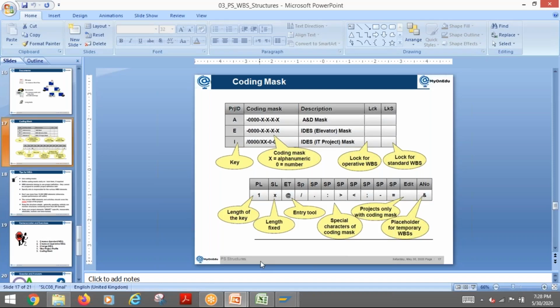Basically, as per my knowledge, for network activities I don't think more than 4 levels are required. Am I right? It may be required, for example, in an EPC contract. I worked in oil and gas and EPC projects, and those projects normally come to 6 levels. Then we reserve 1 for level 7, in case some additional difference comes. So big projects go up to 6, but for a smaller project, 3 or 4 is enough.